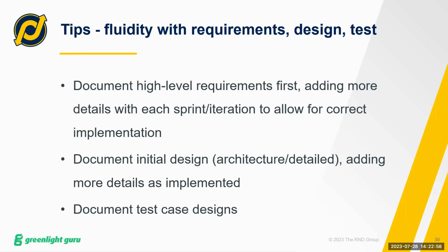We will create test case designs that are reviewed. And in the test case designs, we talk about different scenarios that we plan to test. And this saves time, because this is an agreement that the verification engineer understands the feature well enough and thought about the right scenarios, or maybe missed some, and so they're added before time is spent on developing those test cases and putting in the specific details of how to execute. So those are some tips that we've implemented in our organization.